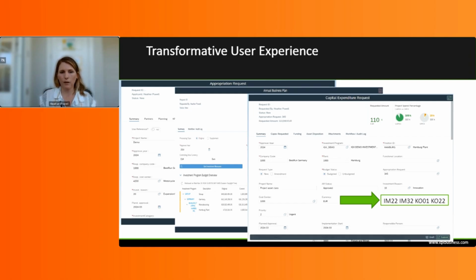Now the capital expenditure requests, when they are raised, a delegation of authority or workflow approval matrix for a capital expenditure request would be triggered, because those approvals can be quite complex, with many different areas of the organization needing to be part of that approval process. You might have procurement, the tax, you might have a business unit specific engineer, you might have the CFO or the CEO included depending on the value of the capital expenditure request, and being able to have a very configurable and flexible workflow allowed you to include or exclude depending on the types of requests that the client was raising.